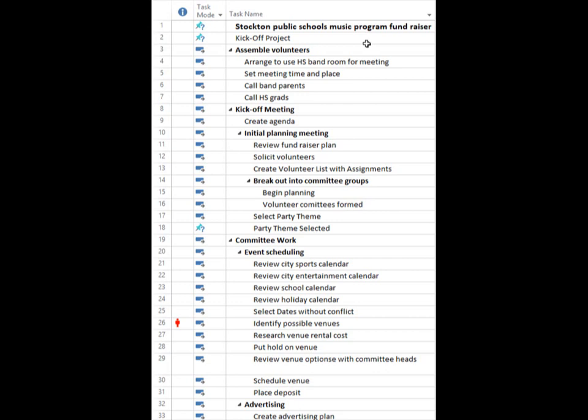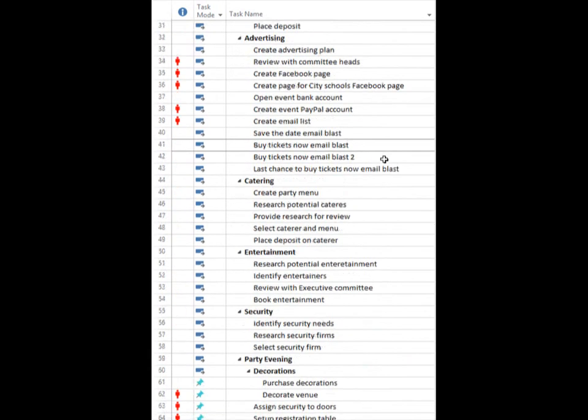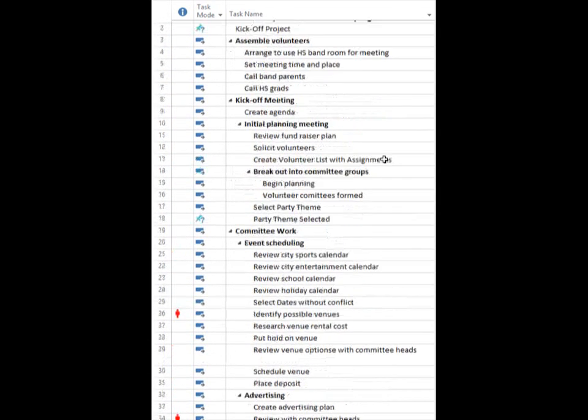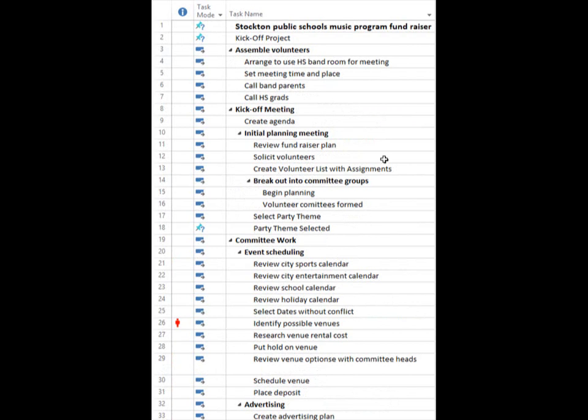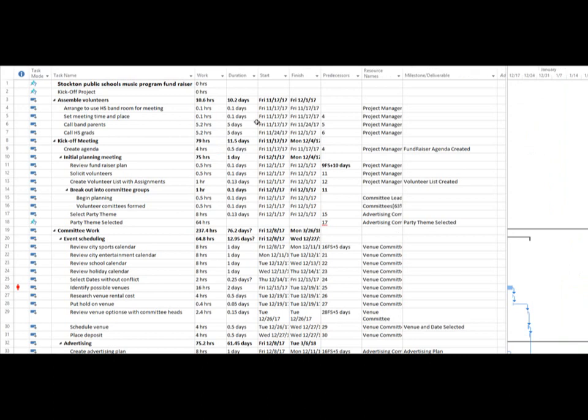In Module 4, our assignment is to take our WBS and really turn it into the makings of a schedule. And we do that by taking our schedule and starting to add representative data to that schedule. In other words, we're adding our predecessors, which link the schedule from beginning to end in a network, task followed by another task, followed by another task, followed by another task.